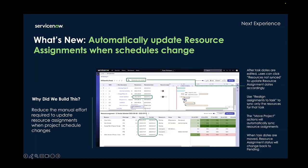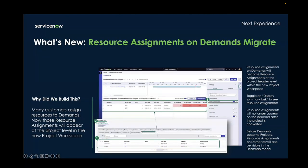Any resources that had been previously approved before the change will now go back to pending when the dates change. Resources on demands also now migrate — many customers assign resources first to demands, and all those resource assignments will be converted over to a project when the demand is converted to a project. They're assigned at the project level, so you have to toggle on the display summary tasks to see resource assignments. You will also be able to see resource assignments on demands in the allocation heatmap model, even before demands become projects.